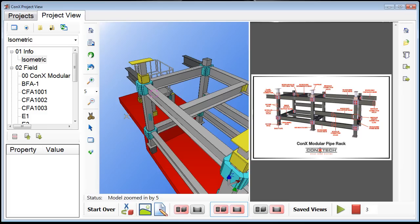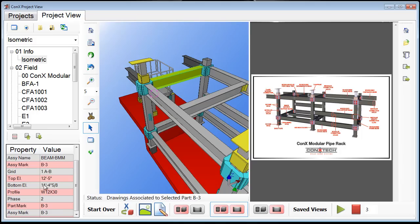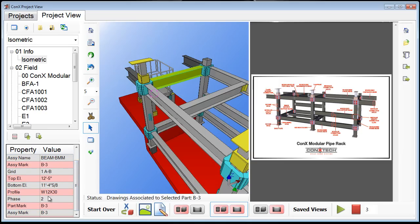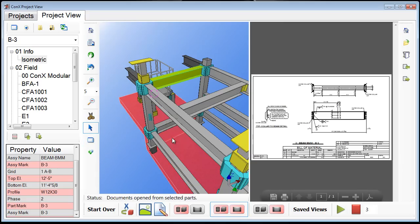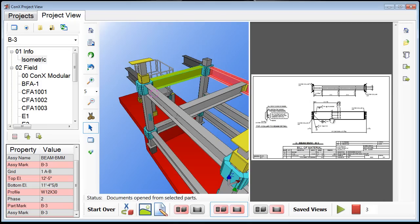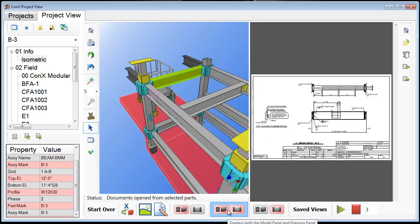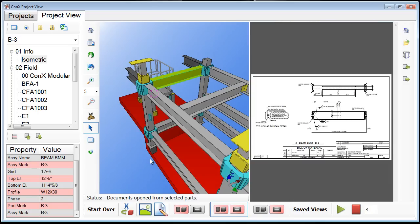A neat feature added to Connex Project View is in the documents list we can choose the option to select a part in the model. When I click on a beam it will show me properties specific to that beam. These properties are specifically restricted to things a project manager or field superintendent might be interested in — things like the piece mark, weight, length, its grid location on the project, and what sequence or phase it's in. Once I've selected this beam I can press the view drawing button and automatically see the shop drawing or any part drawings or erection drawings associated with this part in the model. I can view the entire drawing, look specifically at the model, or both the drawing and the model at the same time.